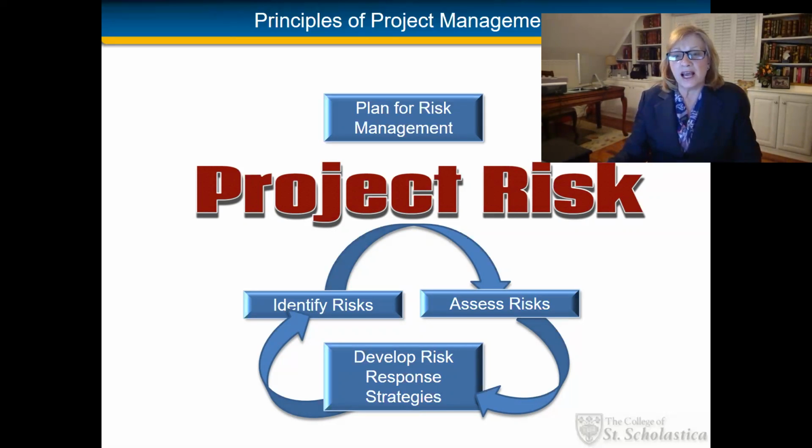Once we know how we want to approach our risk management for projects, we have to identify risk for each project. This risk identification process should start when you are evaluating projects for selection, and of course at a very high level of analysis. There is also risk identification taking place in the develop charter process. This risk identification process will become much more in-depth as more information about the project becomes available. So just know that project risk identification is not a one-time effort. It is a process that is evident throughout the project lifecycle.